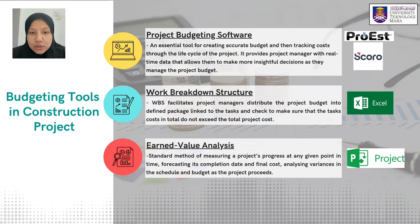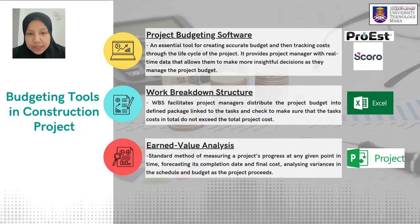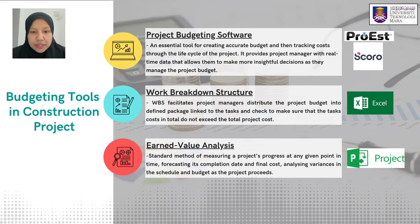The second tool is the Work Breakdown Structure (WBS). Project managers can use WBS tools to distribute the project budget into defined packages linked to tasks and check that task costs in total do not exceed the total project cost. The third tool is earned value analysis, a standard method of measuring a project's progress at any given point in time, forecasting its completion date and final cost, and analyzing variances in schedule and budget as the project proceeds.